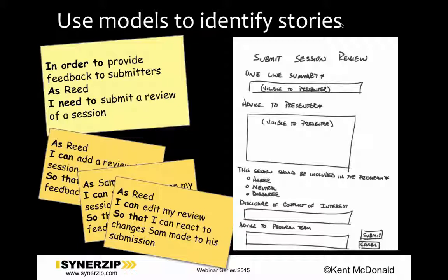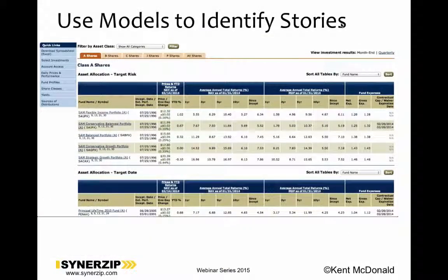To give you another example of this, I was working with an organization that was trying to build a website that they were using to provide information to their advisors. So the way we started out with this is we needed some way of breaking the effort down into small chunks. So we modeled this out, and this is actually their existing site, and we said, well, we want all of this functionality. It's going to look different. But one of the things we did is said, well, we can break this up into bits so that we can deliver it bit by bit. But each one of those small chunks would still provide some value.